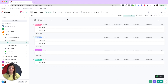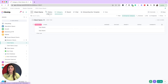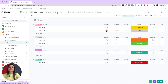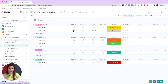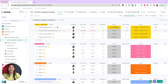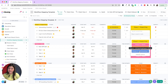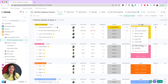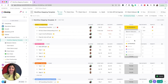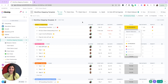I'll move it back to status. You can see I actually created two views: one is by status and one is by category. In our workflow mapping template available in our shop, the project is grouped by the dropdown phase so you can still visually see it in phases, but the status of that task is still To Do, In Progress, Review, Needs Edits, etc. When thinking about whether something should be a status or a dropdown, ask yourself: what are the actual statuses of the tasks going to be versus what would really be a category for that task?